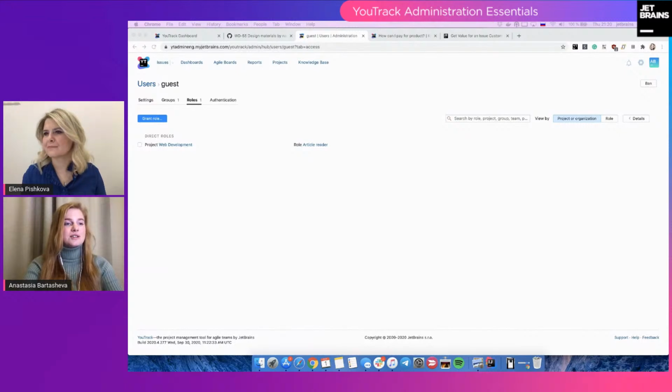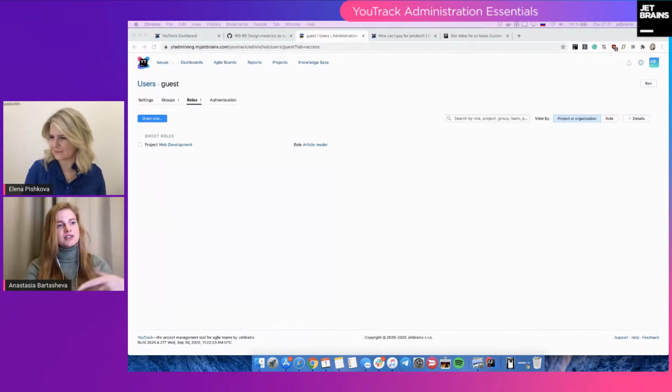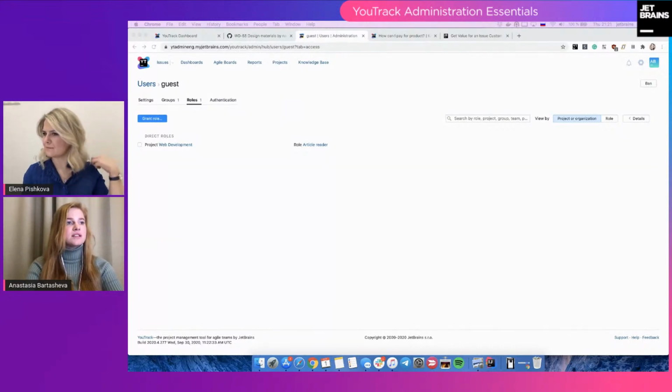So yeah, when you log your spent time, the Burndown goes down. But now we are going to release, it is already implemented, the following logic. You have an original estimation and your current estimation. So when you log your spent time, the estimation is decreased accordingly, and based on this estimation time, the burndown is calculated. So yeah.